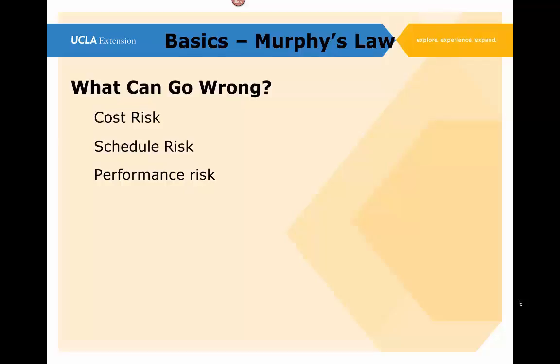But when that time comes that they're supposed to join our project to start the tasks, there may have been other priorities in the company or other work in the company that they can't be released from. And we may have to be delayed and not be able to get their services for a couple of days or even weeks or longer. That would be a schedule impact to the project. These are the kind of things that we have to think about regarding the project.